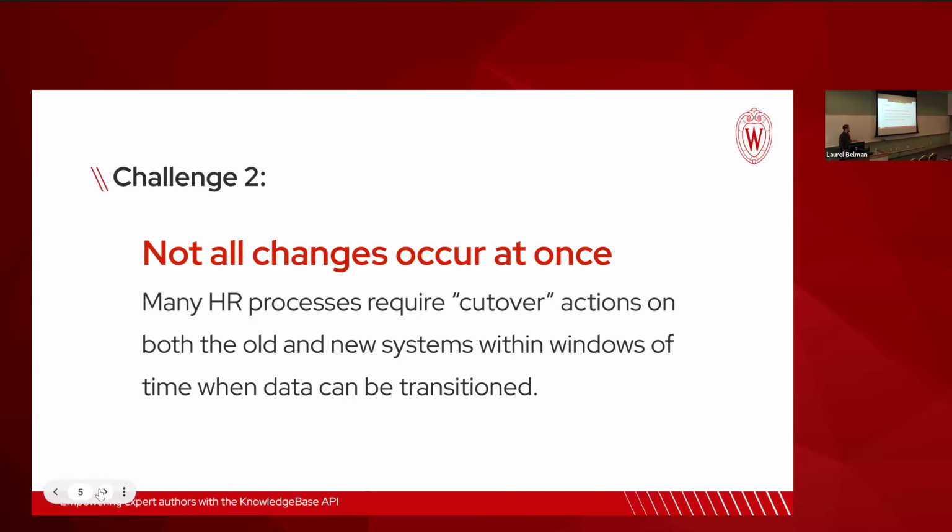But not all these changes are actually happening at once. The cutover activities that the HR teams need to do generally are based around a window of time when something needs to happen before a certain date for something to be in place after another date. So there's a lot of cutoffs, and these cutover activities are very specific sets of instructions that these teams need to follow.